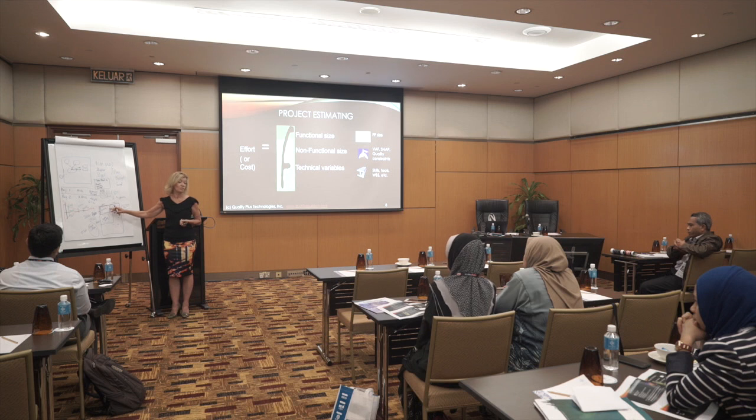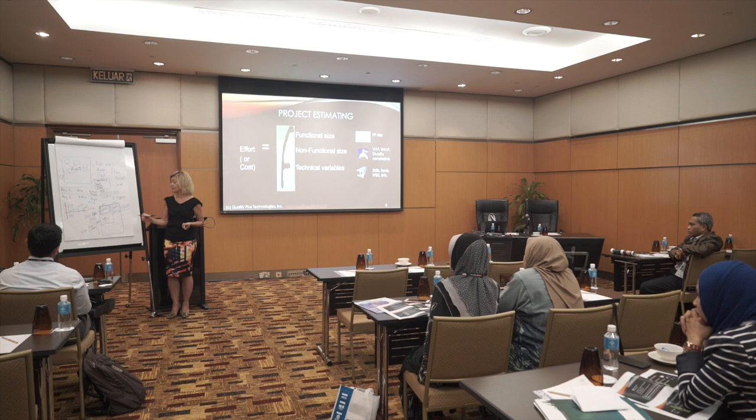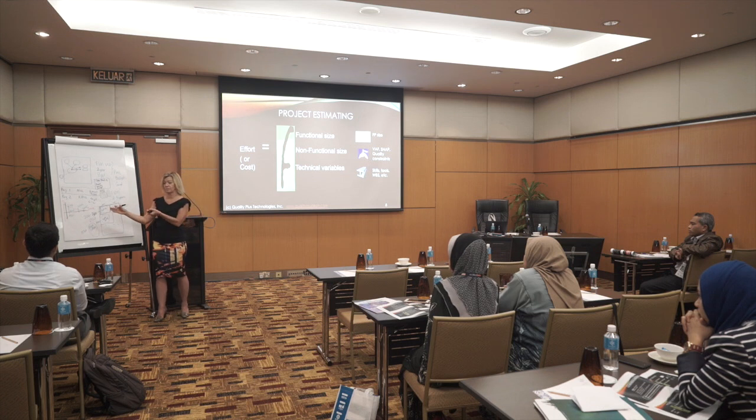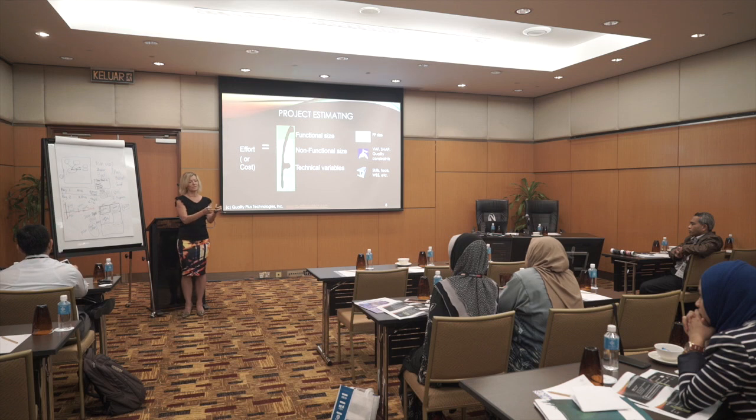Well, you want to trade out 100 function points. If you do that at the very beginning, when we haven't started them, yeah, we can trade 100 function points for 100 function points. That's like crossing something out on a floor plan. What does it cost to change requirements way at the very beginning when it's only on paper? Does it cost you anything? Not very much, right? Cost you minimum. But what if I'm 3/4 finished coding that report?